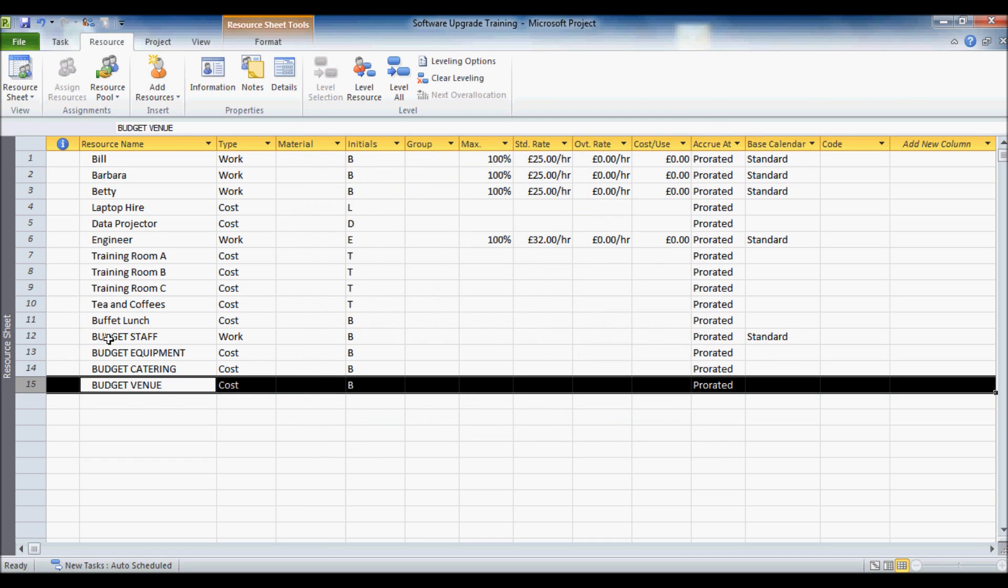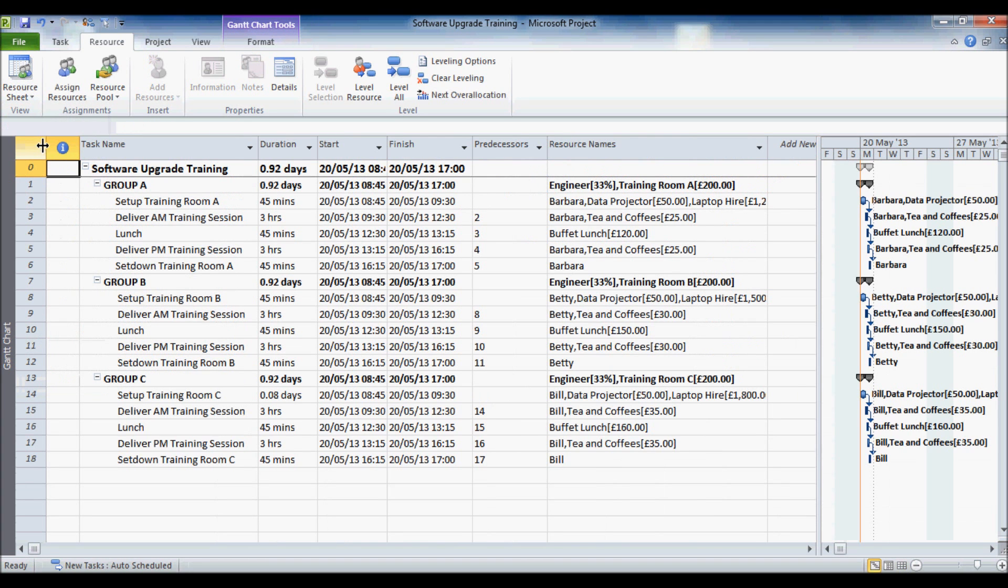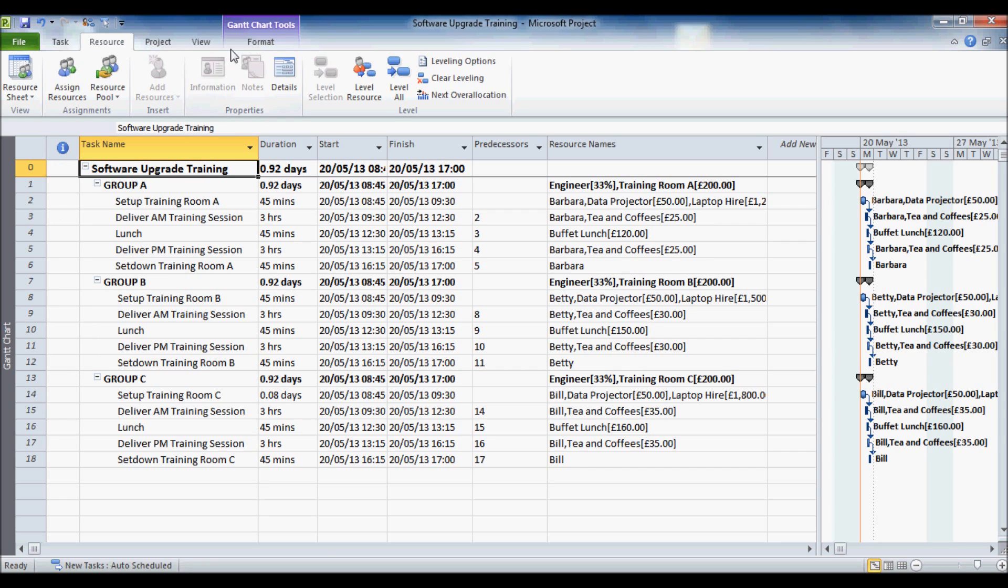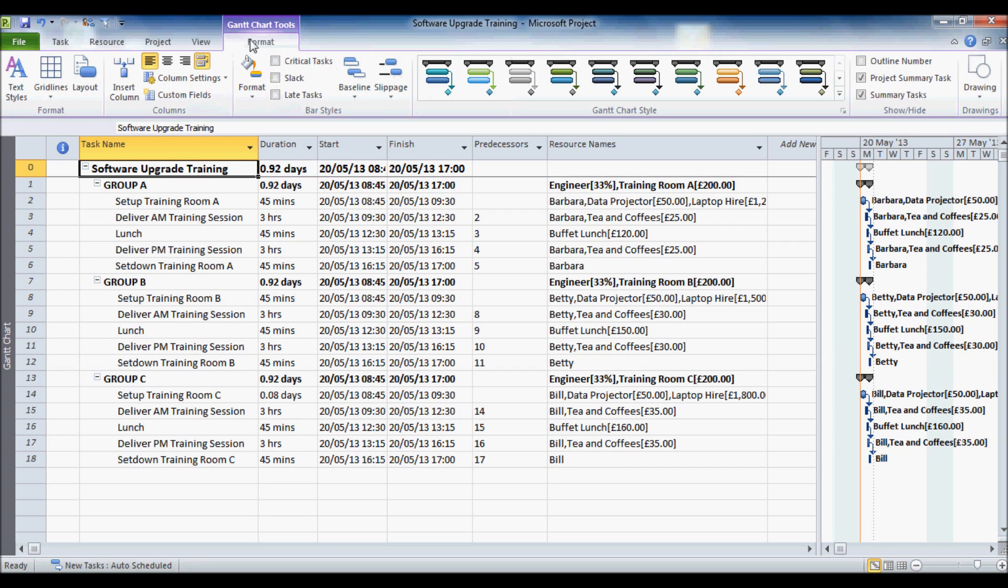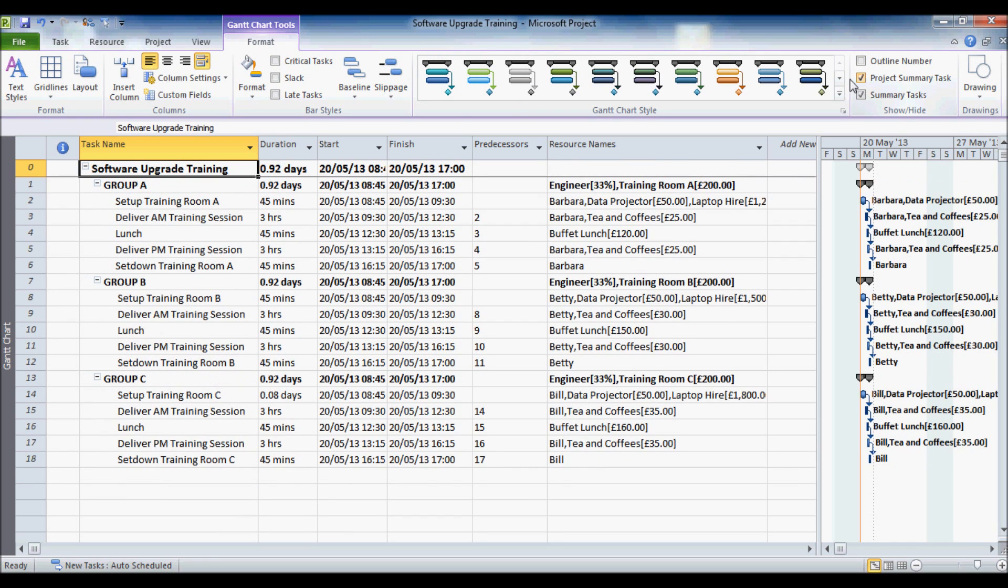And then what I have got to do is assign these budget resources to the project summary task. Pretty easy to do that, I will just go through and change my view to my Gantt chart view. Now there is my project summary task. If you don't know how to show that, that is on the format tab, project summary task, that little check box there.